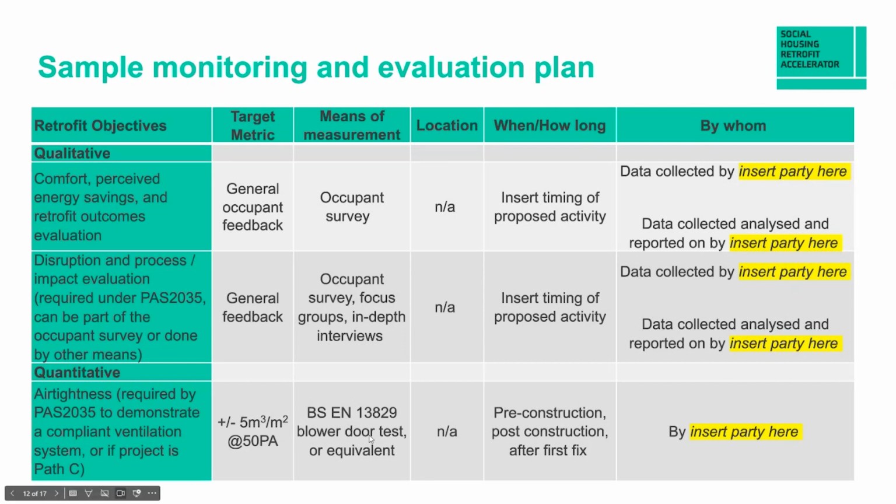There is a blower door test that you can do, and the details are there. What you do is you do that pre-installation of anything, so you can test how air permeable the building is, how many air changes an hour you would get with that building, and then you do your retrofit elements. Before you do all your finishing, you would then do another air change test just to see how it performed.